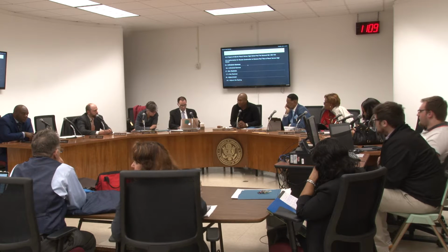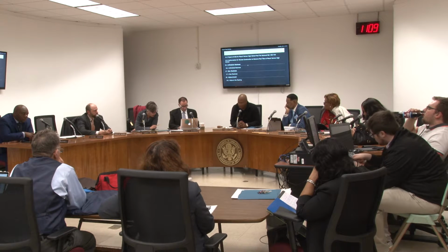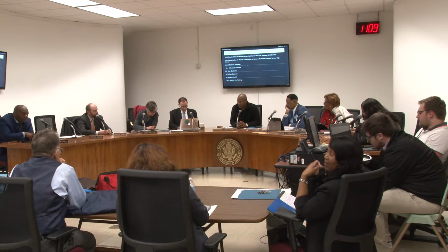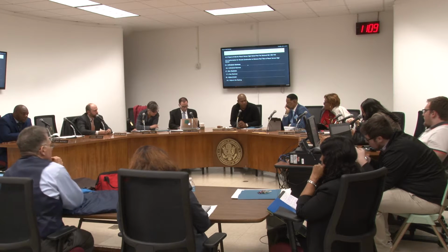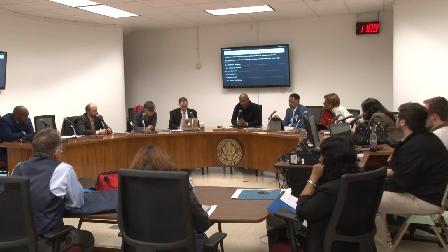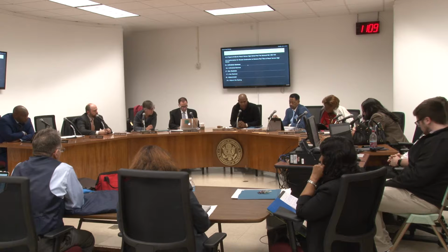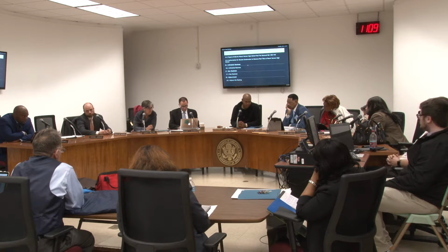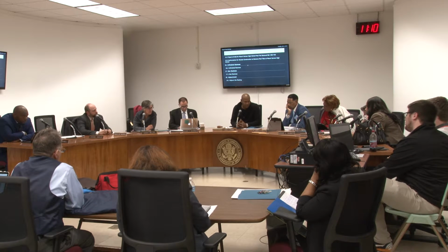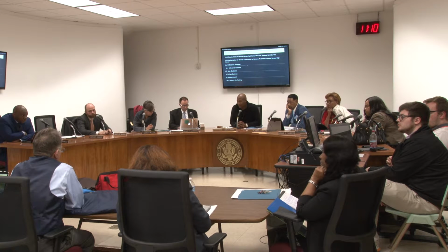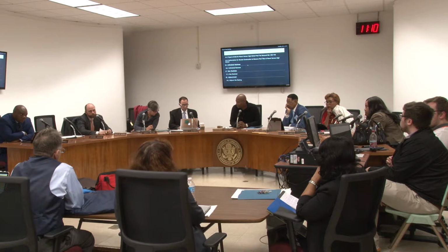Because it was very, very circular. I dug deeply into it in the committee, and at the end of the day, it was just one of those that we just have to kind of keep moving. There's no extra materials, Trustee Fioran. The change order in the particular material just was that much more in terms of, I guess, the delta between what the contractor had probably already purchased, what he had to return, fees associated with the change, and so there is no excess material that we could use anywhere else. Mr. Silver, if you have anything else to add to that? Okay, so that is basically the explanation.